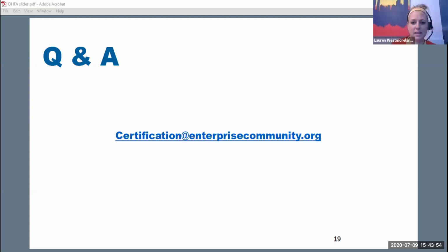Great. And then one last question, and we'll see if we get any more in the chat box, is has the certification timeline changed from the 2015 to 2020 criteria? It has not. So it is still 30 days prior to construction to submit your pre-build application, and 60 days within construction end date to submit your post-build.